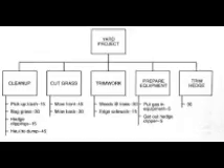The equipment, to get the equipment ready, you are going to need some time for that as well. You are going to need 10 minutes. 5 minutes for gassing the equipment, and 5 minutes for getting the hedge clipper out of the shed. So you have prepare equipment that will take 10 minutes. Then trim hedge will take 30 minutes. So the number beside the activities actually refer to how long these activities would take.